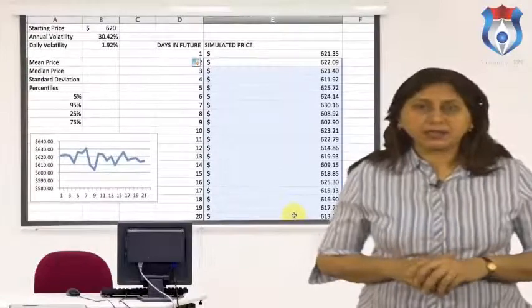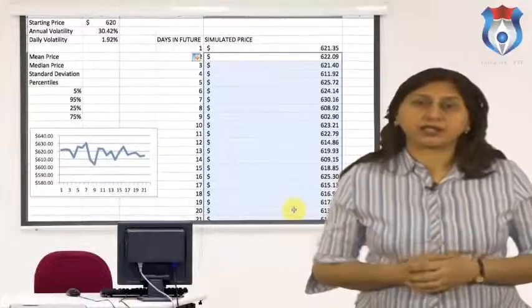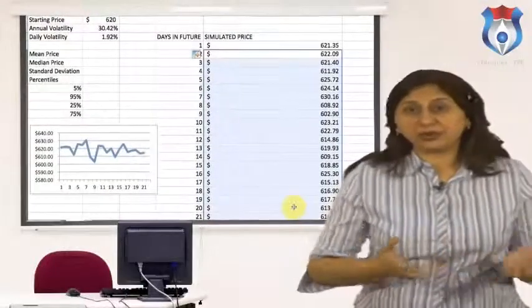In other words, Monte Carlo simulation generates hundreds of alternatives for a project. The answer may fall anywhere within the range of the results produced. All inputs are independent of one another. Thus, when the variables are correlated, a correction to the Monte Carlo simulation is required. To account for correlation, a correlation matrix in the Monte Carlo simulation is used. The correlation value for each set of variables is entered in the matrix, and when the simulation is run, correlation among the variables is accounted for.